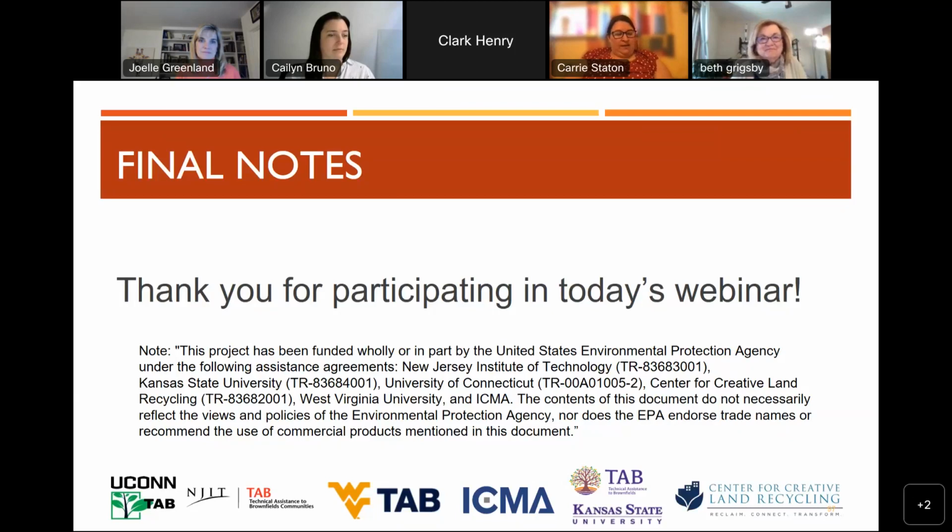Also keep in mind regarding requirements for community notification on your cleanup grant, that if you submit early, you must have had your notification 2 weeks before when you submit, not 2 weeks before the deadline. So make sure that you're scheduling that meeting in such a way that you don't get messed up. I've heard urban lore of folks getting hung up by that threshold criteria in previous years. Your tab provider can help clarify that if you have specific questions. We don't want you to get kicked out for these silly little things, so make sure you're paying attention to those dates.